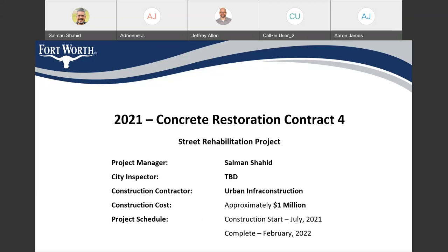My name is and I'll be the project manager. We'll be assigning one of the city inspectors and we'll be communicating that to the public. The contractor is Urban Infrastructure Construction, and this project is approximately one million dollars in construction. The project is anticipated to start in July 2021, which is next month, and is expected to finish by February 2022.